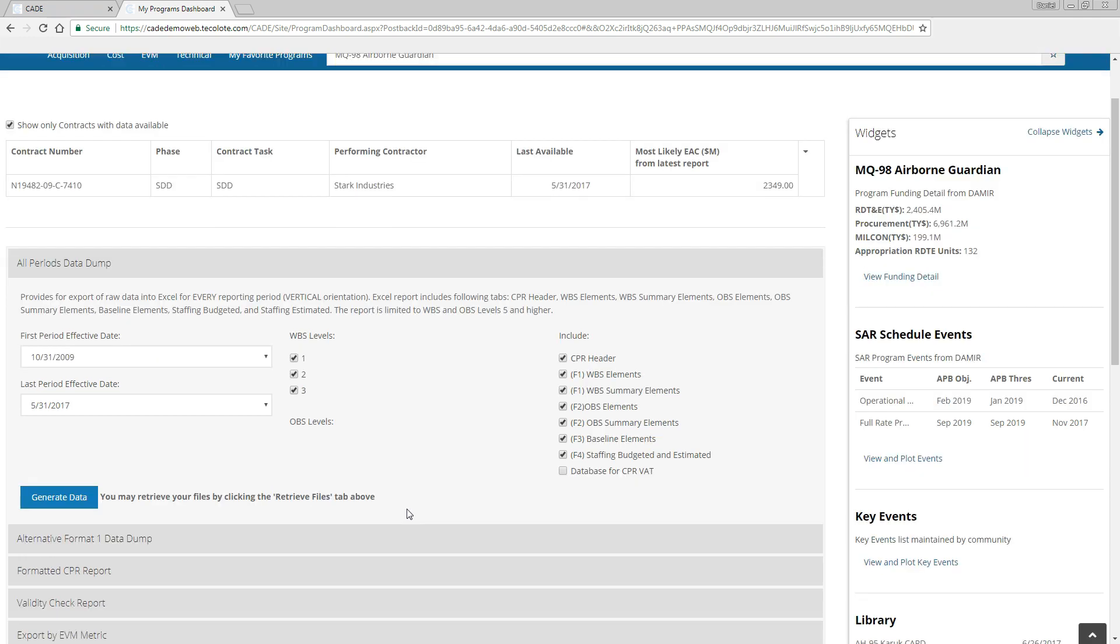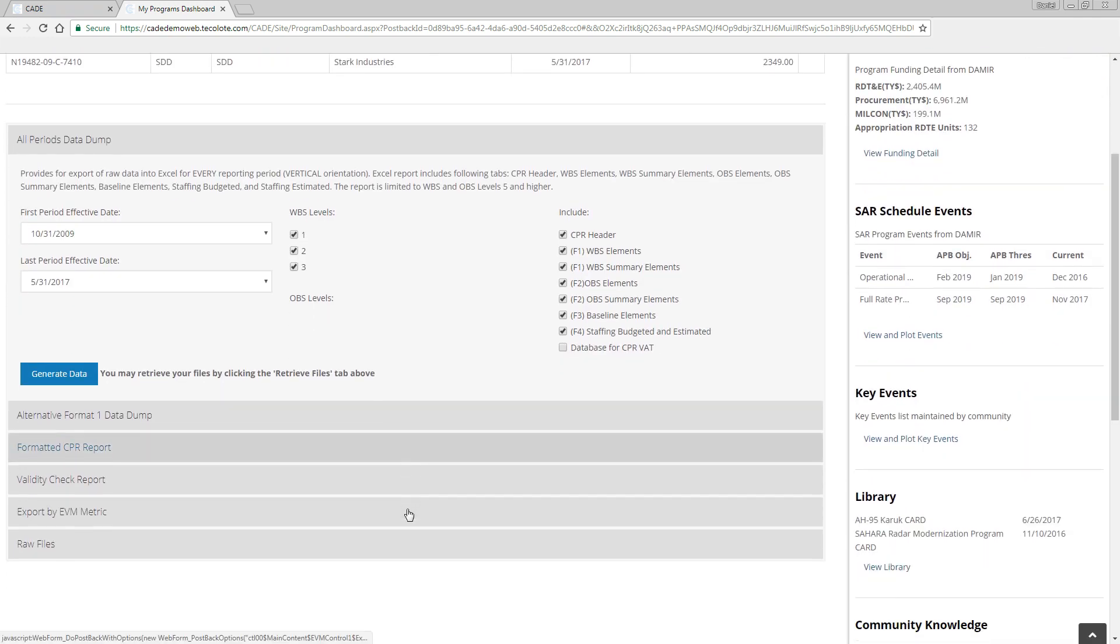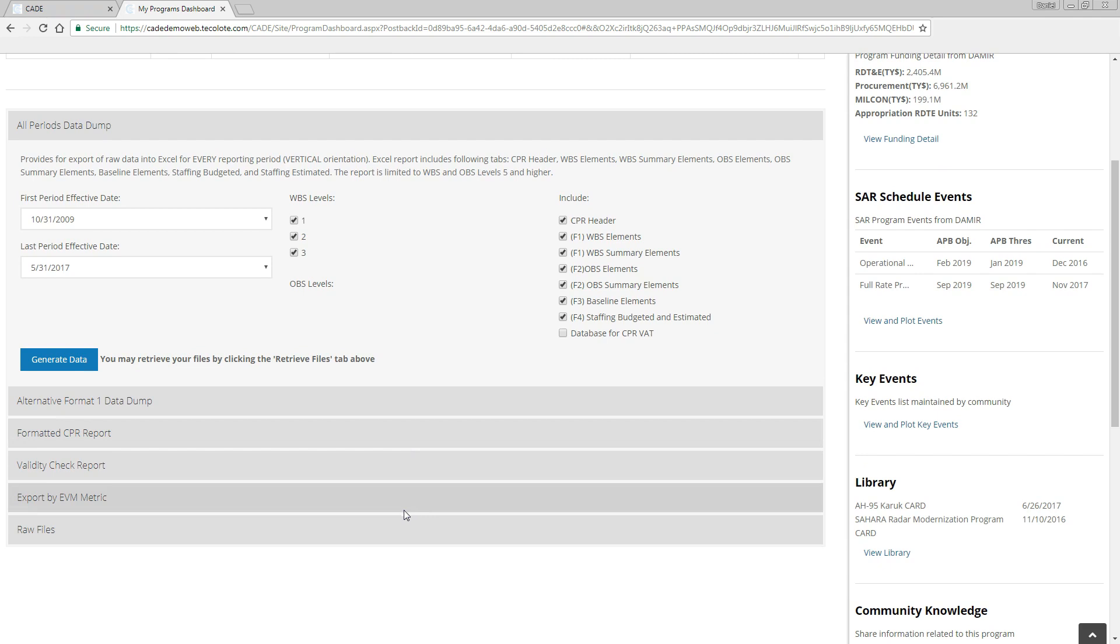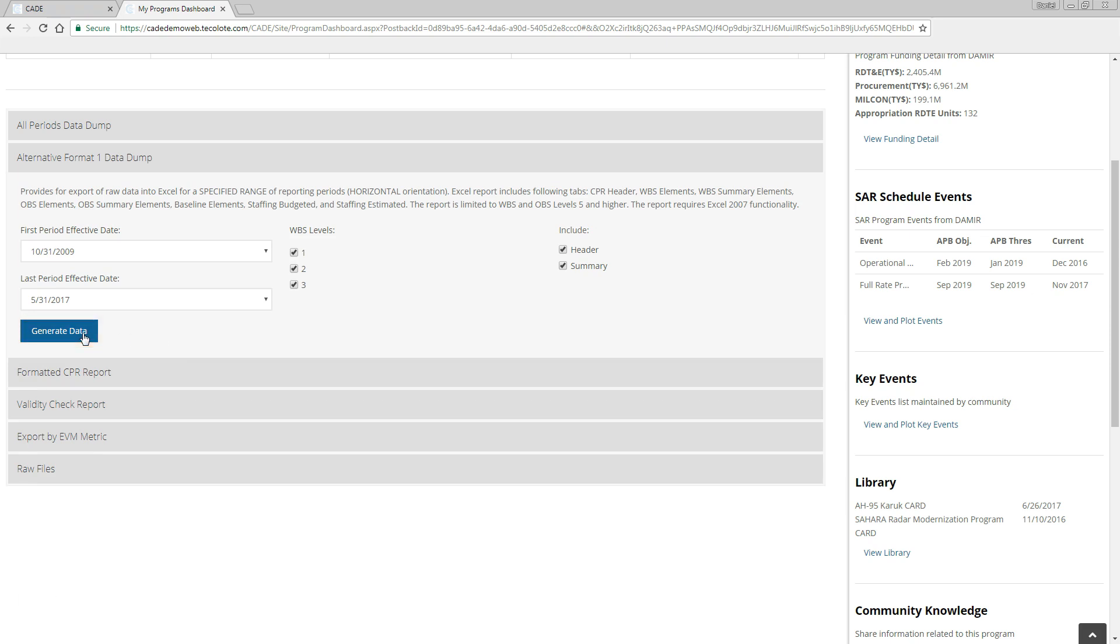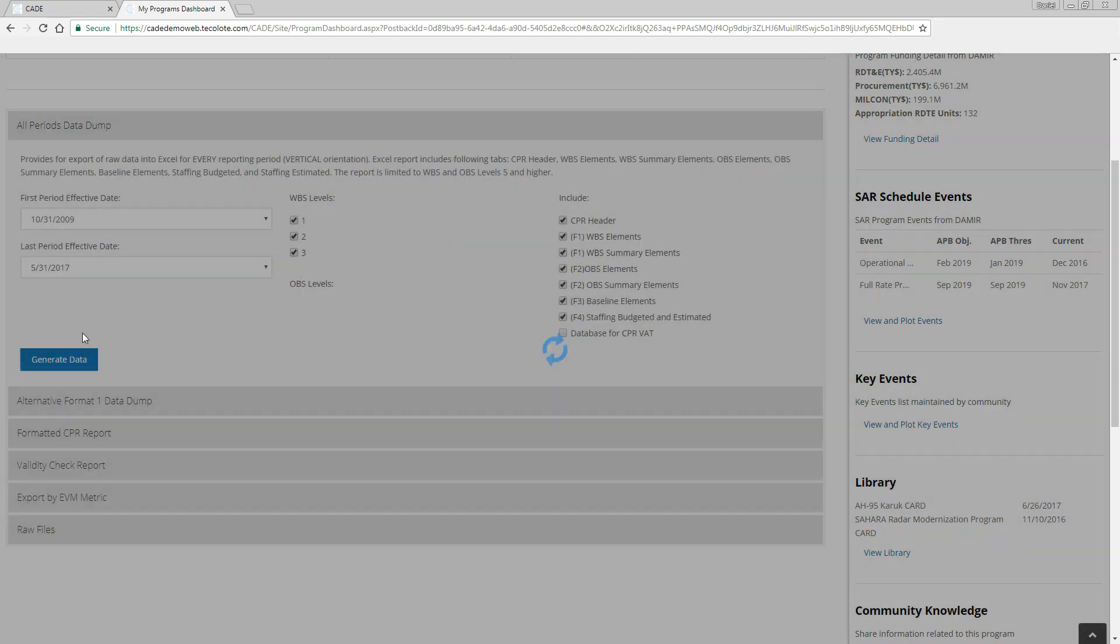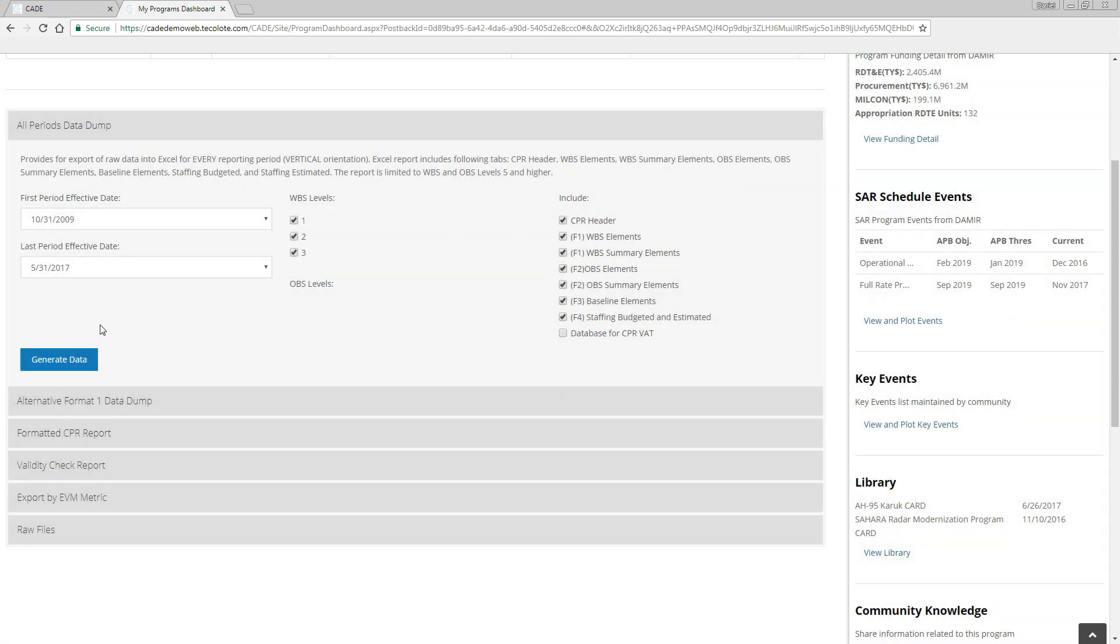To export as a flat file in an alternative format, click on the Alternative Format 1 Data Dump section, make the appropriate selections, and click the blue Generate Data button to generate the job in the queue. This alternative form is generally recommended, but includes only Format 1, so the primary option is Date Range.